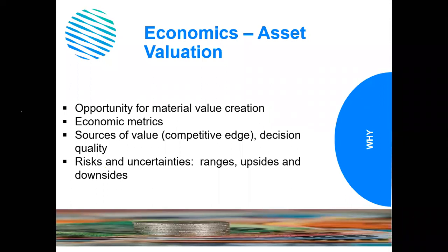I used to work many years ago now for a London listed independent called Paladin Resources, and the valuation methodology that the chief executive there used was quite simple. He did a base case with a discount rate of one level, I think 10%, and then he would always do his upside cases, which would have much larger assumptions on revenues, for example, but he would do that with a, say, 14 or 15% discount rate, and then look at the two together.